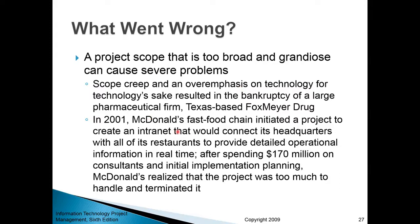In 2001, McDonald's tried to create an intranet connecting its headquarters with all its restaurants to provide detailed operational information in real time. After spending 170 million dollars on consultants and initial implementation planning, they realized the project was too big. Intranet projects were still very new in 2001, technology was still emerging, and the project was deemed too complex.